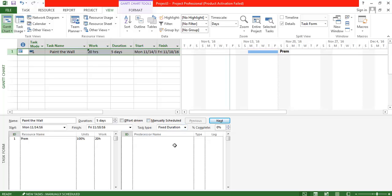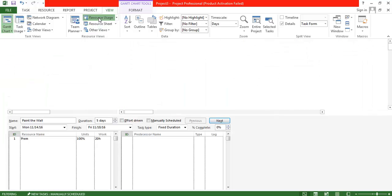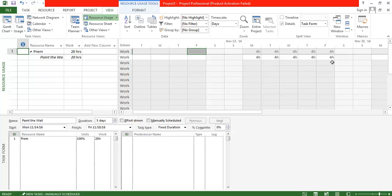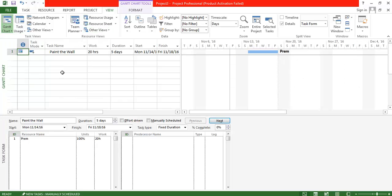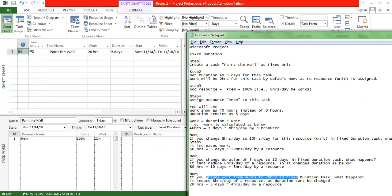This is the exact concept of Fixed Duration: when you change the work, the duration doesn't change — the unit of work is impacted instead. The candidate ends up underutilized, working only four hours when available for eight. So to summarize: changing work impacts unit of work; changing duration impacts work; changing unit of work impacts work. I hope this video helps you manage your project better. Thank you for watching.